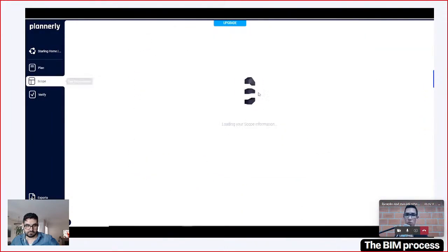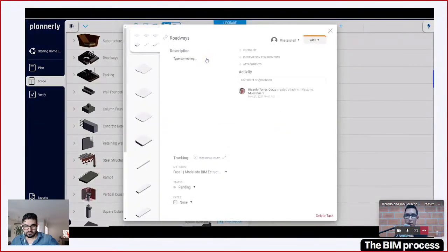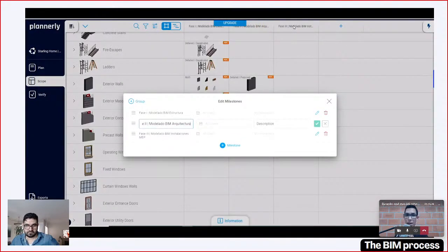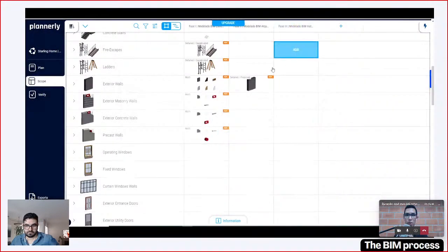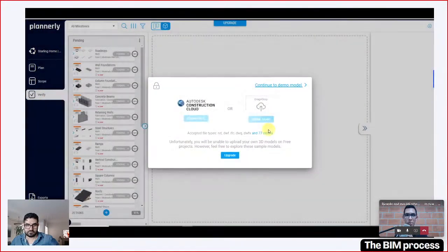And of course, there is a BIM execution plan, which encompasses our scope of work, and we can agree with the customer to what extent we're going to develop what, so they don't get surprises at the end and we end up pointing fingers because we didn't know who did what. So this is why it is important to get this right from the beginning. And of course you can adjust on the go, but it is better if you have this beforehand.